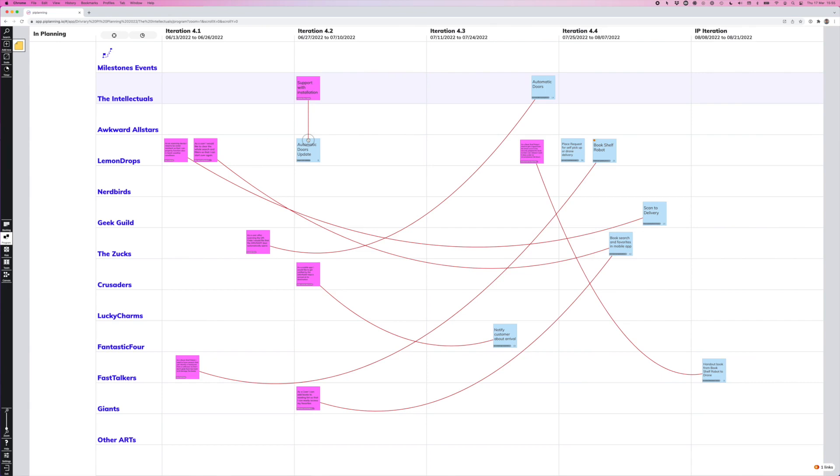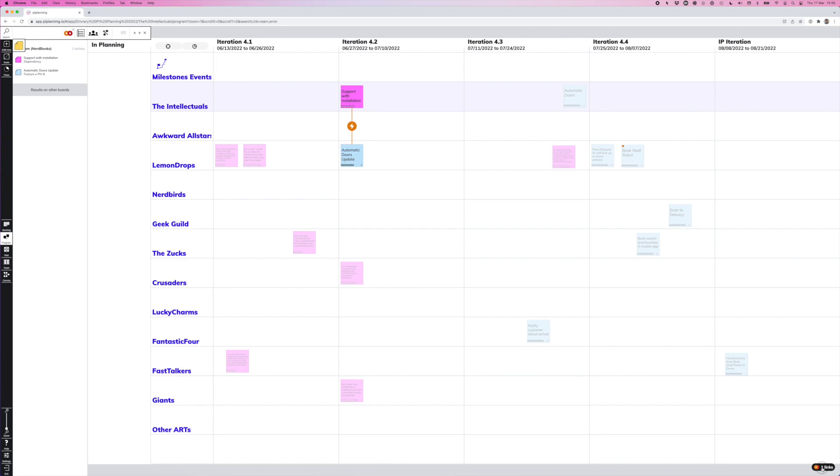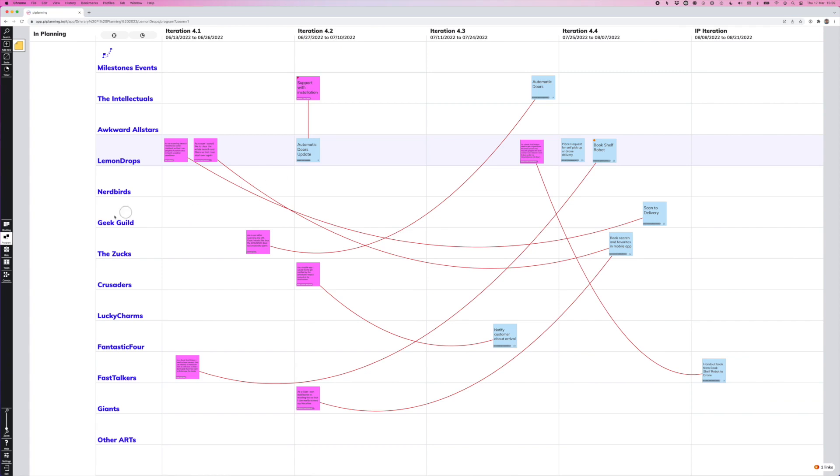Now we can also remove the flag because the RTE should see that this is a resolved dependency. So here you may notice that we have a vertical dependency, which is somewhat risky to deliver the feature in the same iteration where we are still waiting for stuff to be delivered in order for us to be able to ship the feature. So in the lower right corner, you see one that there is a sign that there is one link that is risky. If we click on that, it shows us which link that is. Now there is another type of links that the PI Planning app draws our attention to. And that's the critical links. Critical links is when dependencies planned after we have our feature planned, which would not work out. So we need to do something about it. And those are in red color because we can't just ignore them. It's not going to work in our plan.